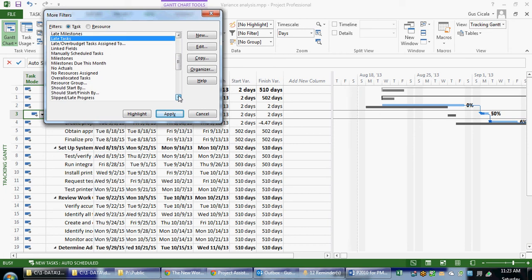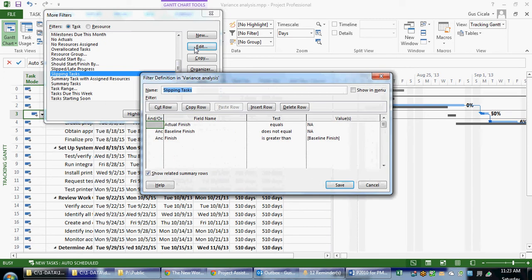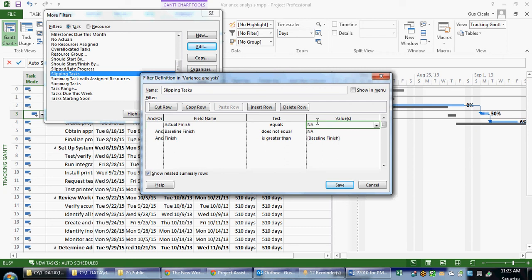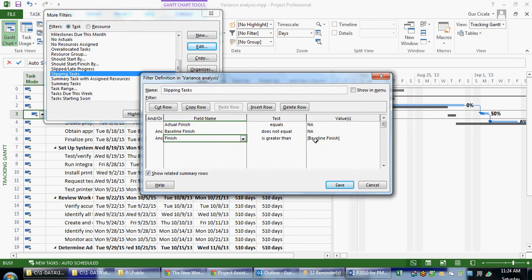I like a filter called Slipping Tasks. If I edit the Slipping Tasks filter, it's informative from the standpoint that it looks at the actual finish not equal to NA. What this is telling us is don't show me tasks that haven't been baselined. Baseline finish not equal to NA means that the task does not have the value of NA in there. Well, if it did have the value of NA, it would mean it wasn't baselined. So it hasn't finished. Actual finish not equal to NA. Baseline finish not equal to NA, it has been baselined. And the current estimated finish date is greater than the original estimated finish date. So this is telling us that it's not finished, but it's scheduled to finish late.